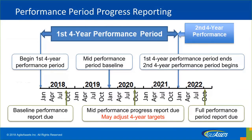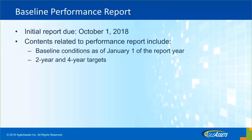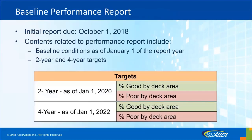If they haven't achieved those targets in the midterm, they have a chance to adjust the goal for four-year targets. For example, in the initial report due in October 2018, the contents are the baseline condition as of January 1st, 2018, followed by the target for two years and the target for four years. The targets are based on the percentage of good bridges and percentage of poor bridges in the network for NHS — National Highway System — bridges.